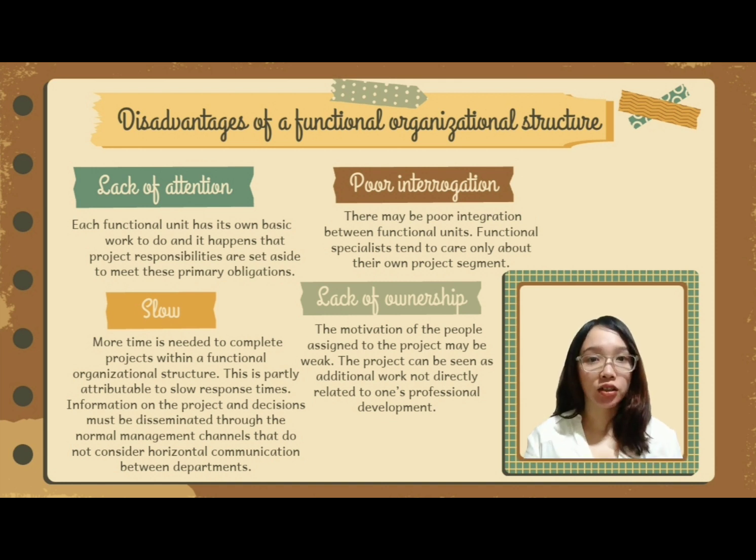The last disadvantage is lack of ownership. The motivation of the people assigned to the project may be weak. The project can be seen as additional work and not directly related to one's professional development. Moreover, since the project members only work on one part of the project, they do not identify with the project as a whole. Lack of ownership thus discourages team members who may not engage enough in the project-related activities. The result, even in this case, will be the problem of quality of the result.